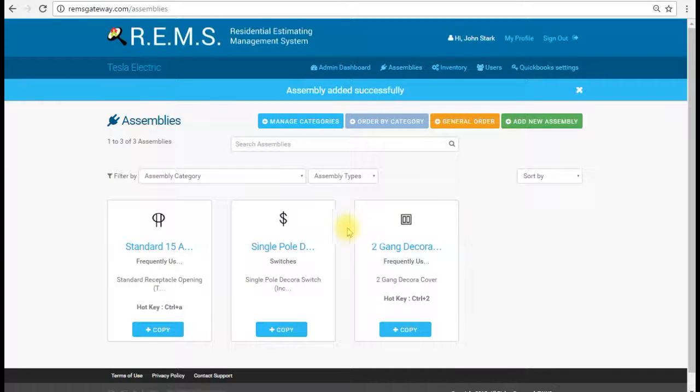So like I said, with all those switches, that way we can gang these switches however we want them to be, whether it's 1 gang all the way to 5 or 6 if you wanted to. And then you can use that plate cover option in transparent mode in editor and place it next to those switches, and it will correct the box and the plate needed, and add that material to our material pick list. So that's how we would get away with the different combinations of switches that are going on.